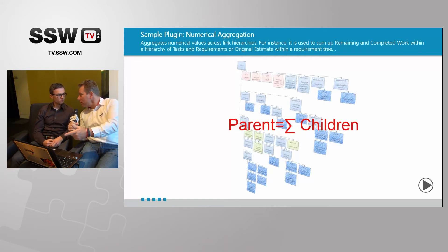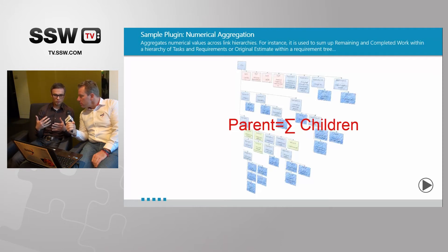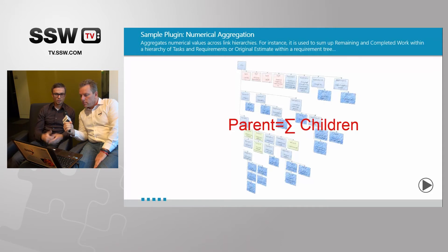Are you surprised the TFS team haven't done this already? Yeah, it turned out to be quite complicated to implement. You could hook up the iSubscriber event yourself, but they did a lot of work to support all the linking changes. If you drag and drop tasks to another requirement, you have to redo the aggregation — it's not just changing values, it's also changing the complete hierarchy structure. It was difficult, but it's a proven solution with existing customers.